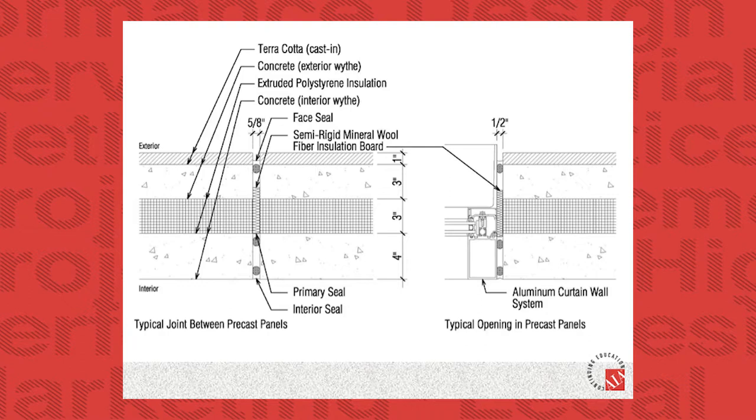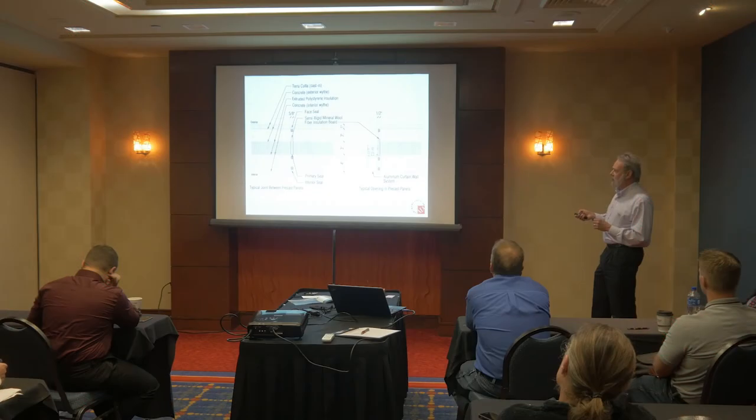They'd put that seal in place. Then they'd set the glass, put the pressure plate on, boom, building's weathertight, completely enclosed, they're done. They can do anything they want on the inside. That was it. The only thing to finish it, put that sealant joint in, put the insulation in right